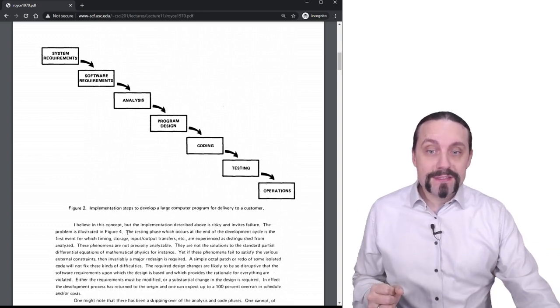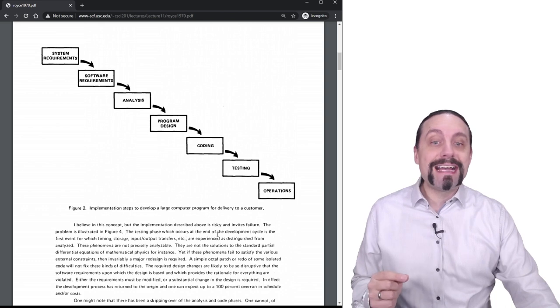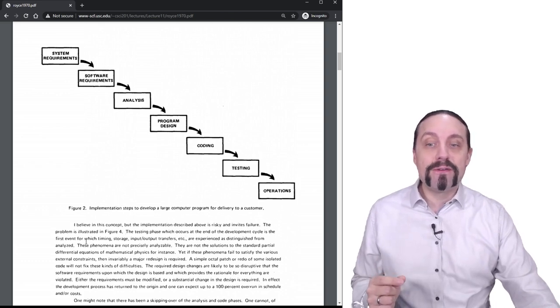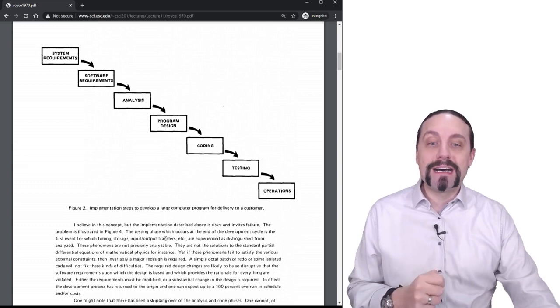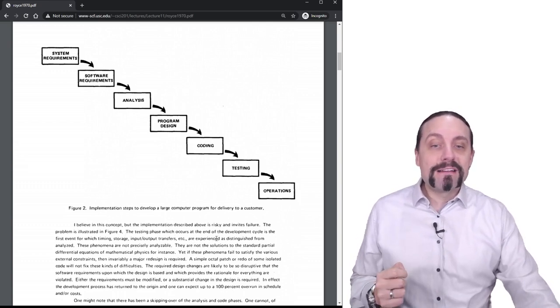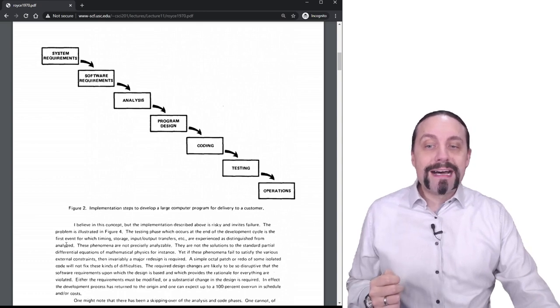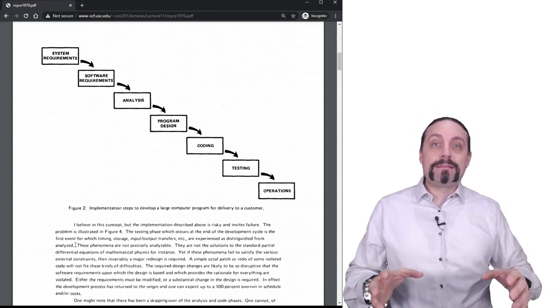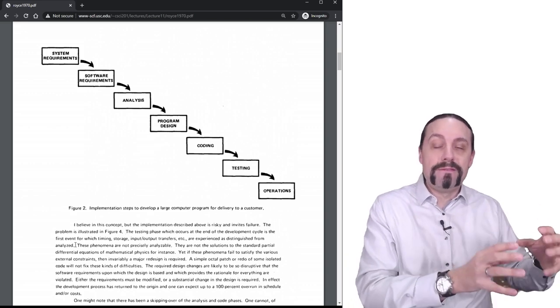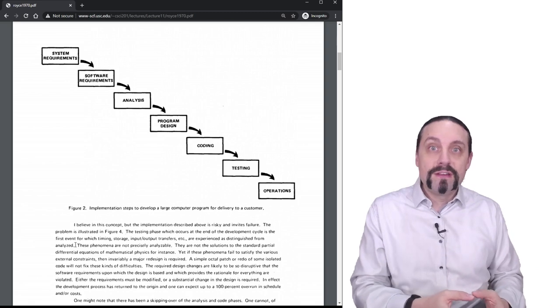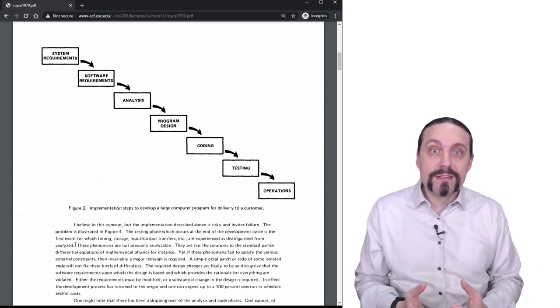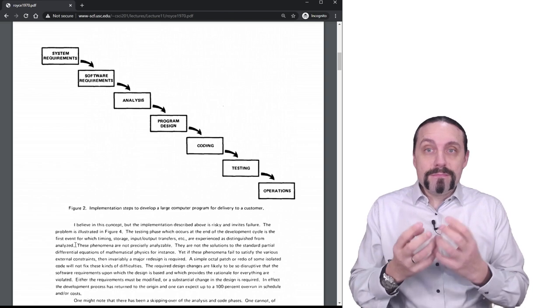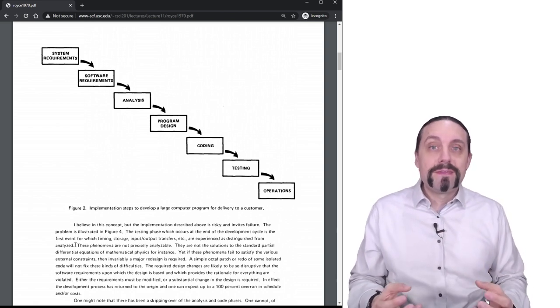And it also says the testing phase which occurs at the end of the development cycle is the first event in which timing, storage, input-output transfers, etc. are experienced and distinguished from analyzed. So what he says is that we have a very late integration at a very late point. We know if the system works. And that's the main problem of the waterfall process.